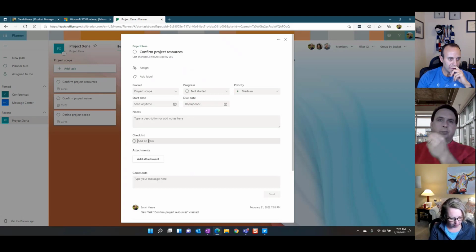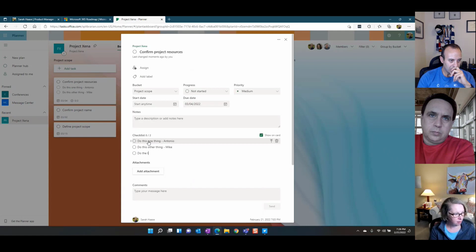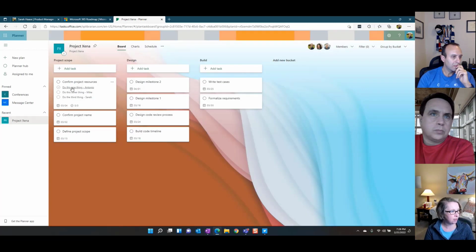So do this one thing, and then I'll say Antonio is going to own that one thing. And if I hit enter, do this other thing, Mike, do the third thing, Sarah. So if you enter in a checklist set of items and you check the show on card, when I close out of this task, you can now see that the different items are here. And what's nice is that you can look at them and you can check off the subtasks, but there's no way to assign a subtask to a person.